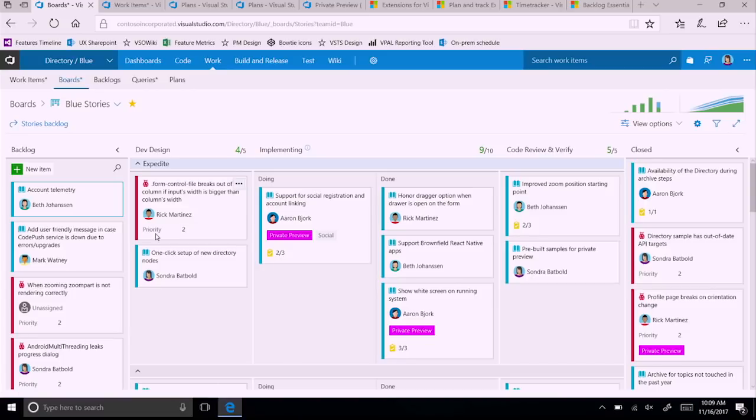Additionally, we added that priority field. So on the bug work item card here, you can see that this bug is a priority of 2. But now that the field's available on the card, I can just single click, edit this, and hey, maybe this bug is worse than we thought. So I'm going to increase the priority to 1. And since that rule is dynamic, immediately that card turns red, and it gives my team a great visual for, hey, we might want to go pick up that card and take a look. So that's a really great way for you to call things out on the board.